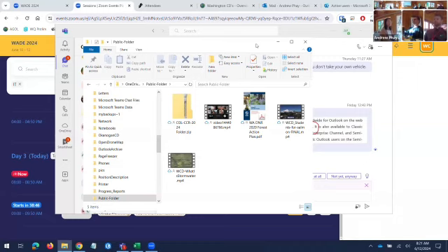3 days before, get a notification. The day before, the day of, get a notification if it's not completed. And a day after, get a notification. 2 days after, get a notification, until it gets completed. And it's just a checkbox that gets completed. And then you can store when that checkbox actually got checked in another date field, if you want.